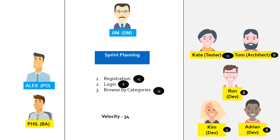The process was repeated for the remaining two stories, in which Jim the Scrum Master asked the team if they were okay with the delivery of those stories during the sprint, and the team responded positively. The cumulative story points of 34 is known as velocity and will be used to plan the next sprint, with the team agreeing to take more or less depending on their experience. Each developer assigns tasks in their name and the required subtasks for design, development, testing, and documentation are created for each story, and the team gets to work. This concludes the sprint planning event.